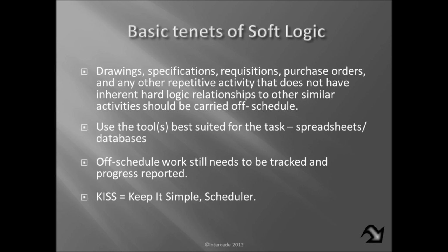But in procurement, I find a database to be particularly effective, especially if you're able to have access to something like a SharePoint site where you can have access to your engineers' material requisition forms, your expediters' status sheets, your purchasing status reports. Then a database seems to work really well for retrieving that data and keeping it all in one place.